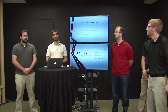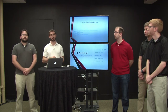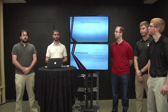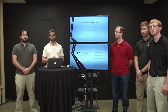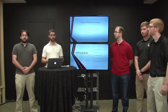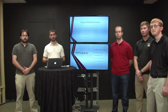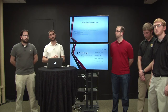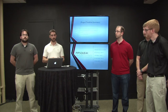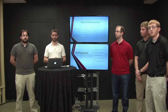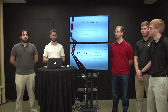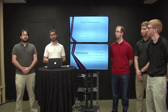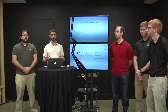So this is just a brief summary of our project timeline. We're going to have five milestones throughout the spring semester. Milestone one is just getting back together, reestablishing communication as a group, doing any initial database setup, and creating a basic layout of the instructor view. Milestone two is going to be the bulk of our project — we've given ourselves a month and a half for this milestone alone. It will include incorporating the audio-video file upload, the code file upload, any code manipulation options the instructor can use to create a tutorial, and putting all those things together.